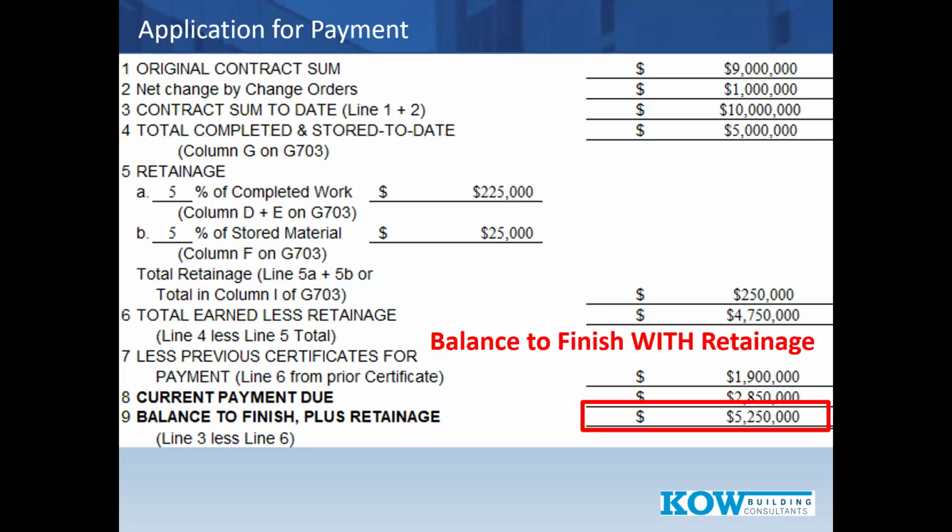Now, why would you keep retainage? And sometimes I'll train newer inspectors that may be very, very savvy at construction, but they'll say, I don't understand, why would you keep retainage? Well, number one, you could keep retainage for things like, for example, your roofer is 100% done, you pay them 95%, and you hold 5% retainage until they get you the warranty and guarantee. Okay, that's one very good real world example. I'll give you another one that happened. This is a real story, and I like when things are illustrated so well in the real world.